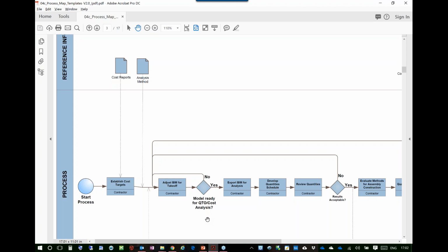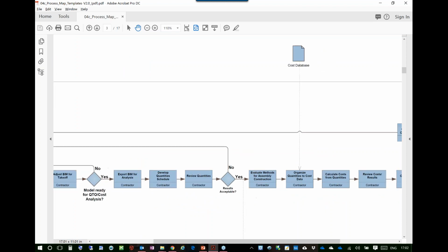So what was easy, Revit, model slab, call it concrete, hit a button, here's your quantity. All of a sudden it becomes something insane. So that's where contractors take it and do more. So from a contractor's perspective, they receive a BIM takeoff. So the BIM takeoff is your push button quantity. Here you go. Contractor, is it good? No. What do I got to do? Augment it. Where does it now come back and feed us?